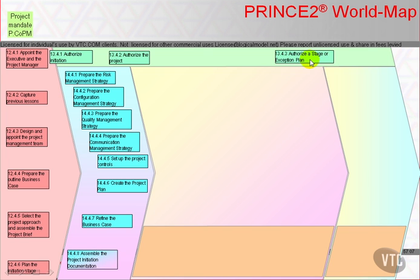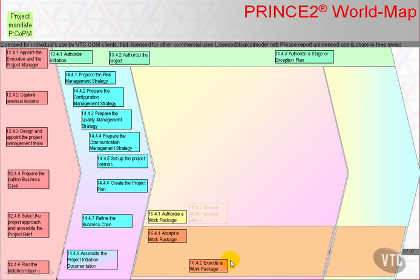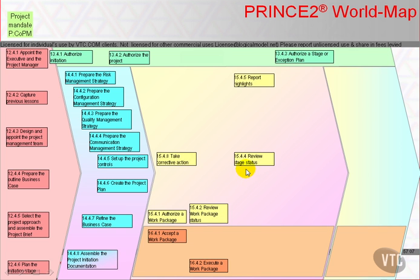Hopefully in initiation there's no exception plan. If the answer is yes, then we authorise a work package and the team manager accepts a work package, executes a work package, and sends checkpoint reports to the project manager to review work package status and consolidate those into review stage status.